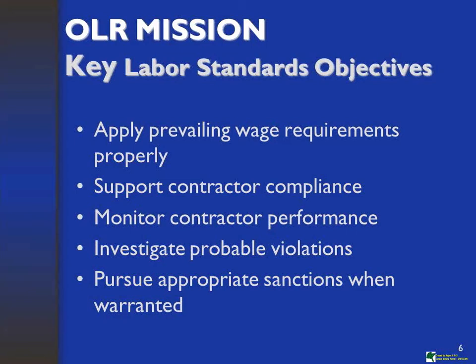Supporting the contractor's compliance. As administrators and enforcement officers, or I'm not sure what the various titles are in the state agencies and local grantees that are here, there should be a person designated as the key person for your agency that handles labor standards requirements. Monitor the contractor's performance. That's through the process of employee interviews and certified payroll reports and such.